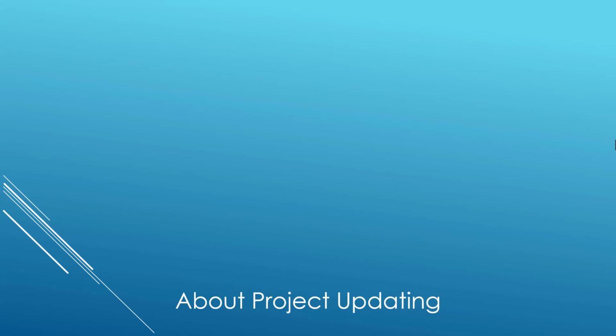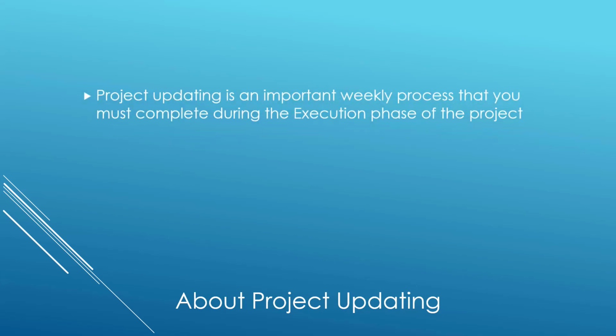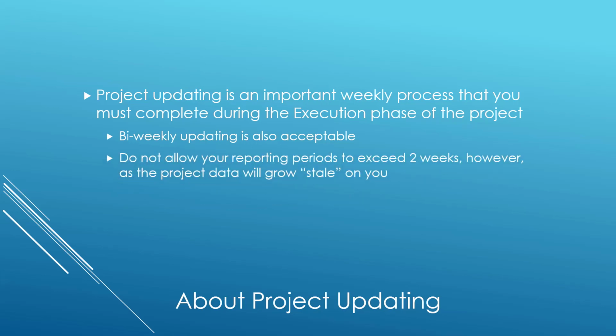First, let's talk about project updating. Project updating is an important weekly process that you must complete during the execution phase of the project. If you're not able to follow a weekly updating process, bi-weekly updating is also acceptable.